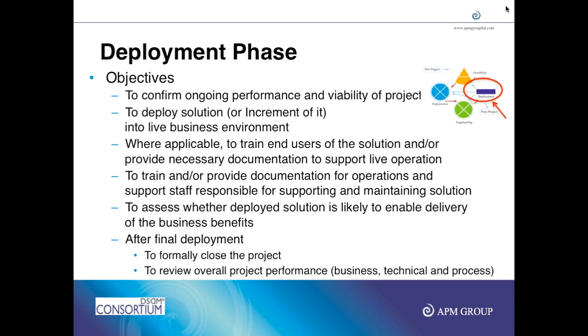You've got to give the knowledge transition, you've got to give them the support information that tells them in what order you have to do the release. Apart from that, the release notes, any outstanding issues, like if there is any defect or if there is any workaround available to fix the defect. So you have to basically do some documentation where you capture the knowledge of the product from a business point of view and from a support point of view. You might also have some training to be done for the support people as well as for the business users, like how to use the system.